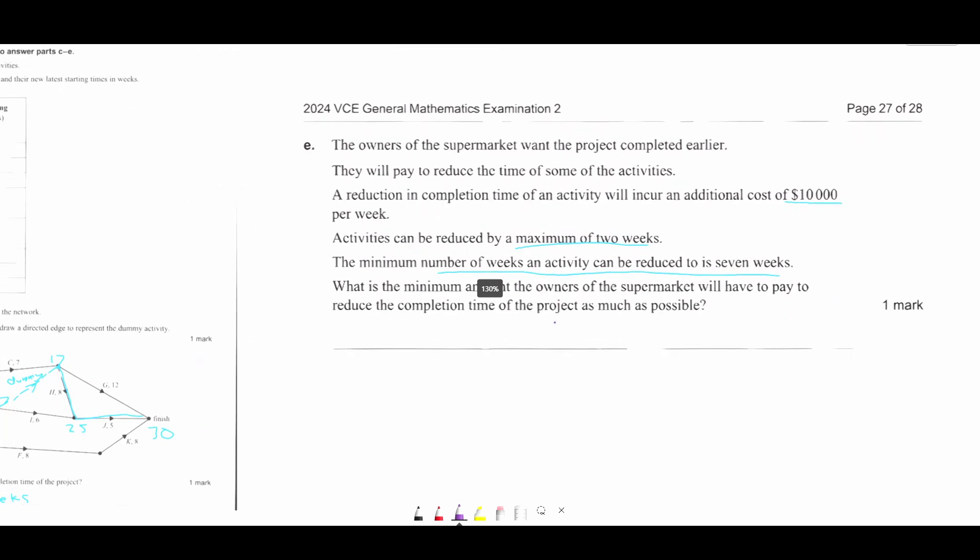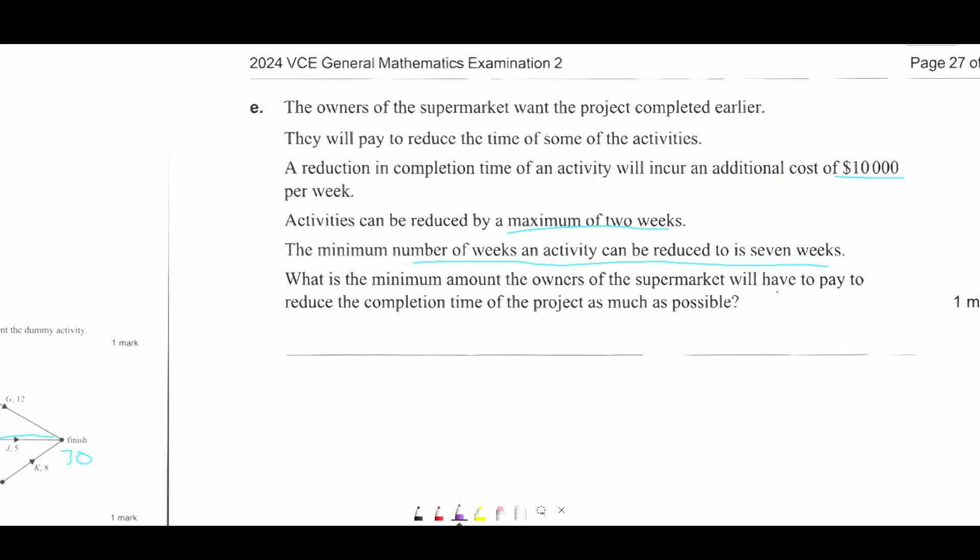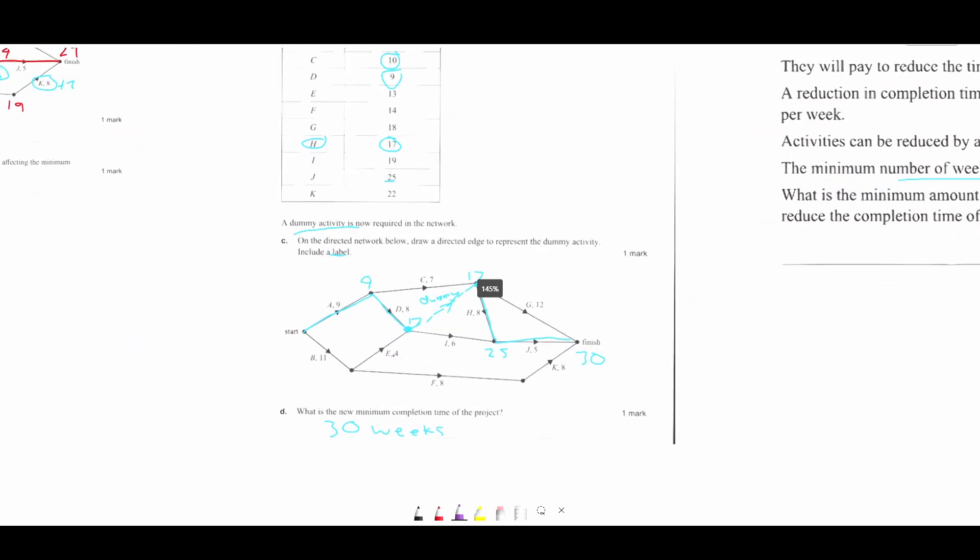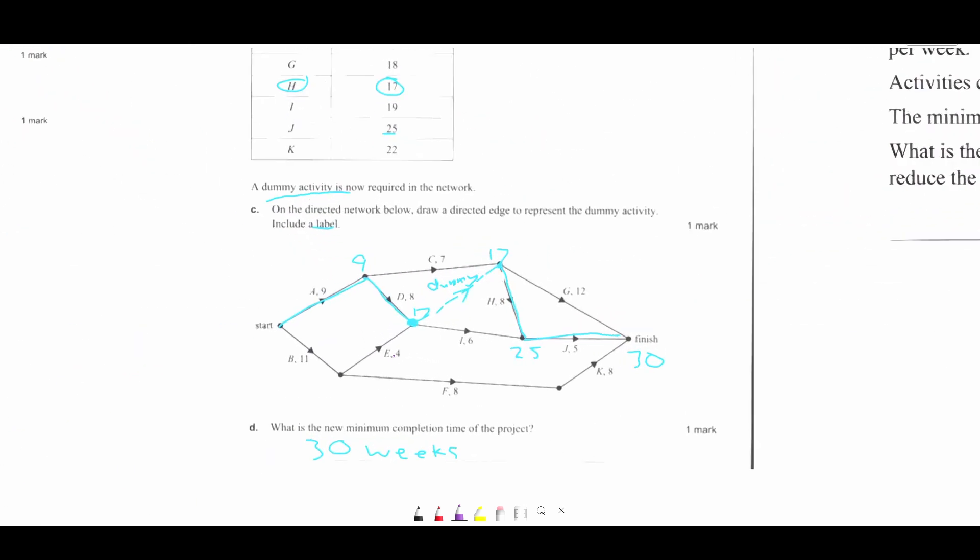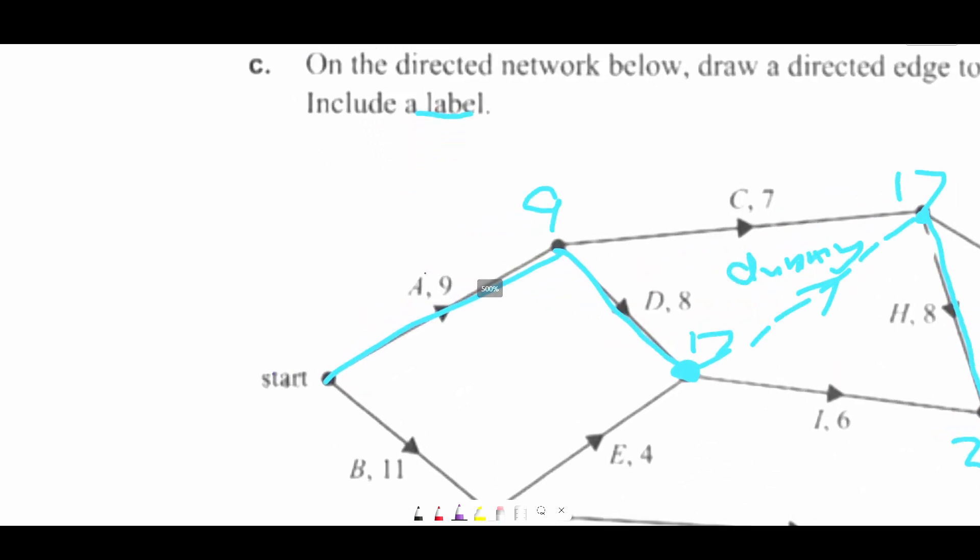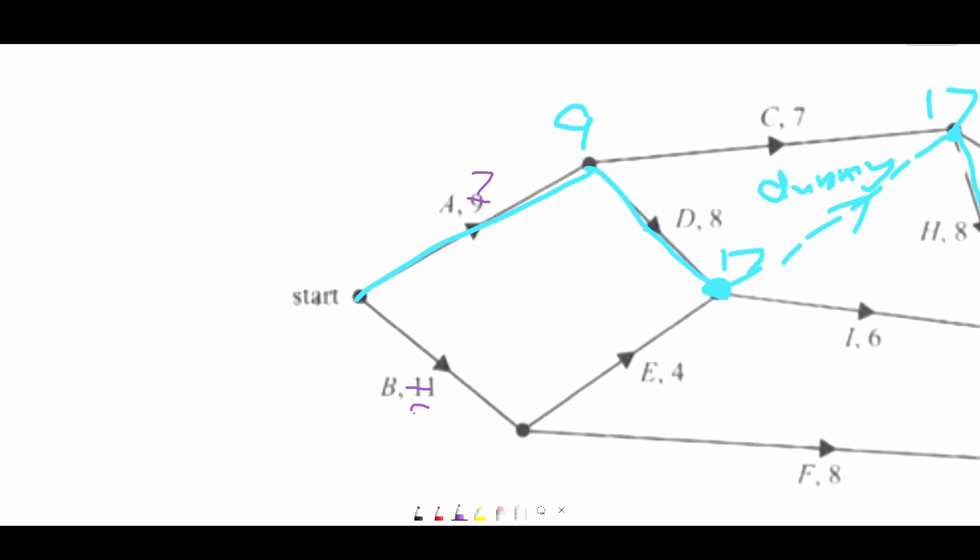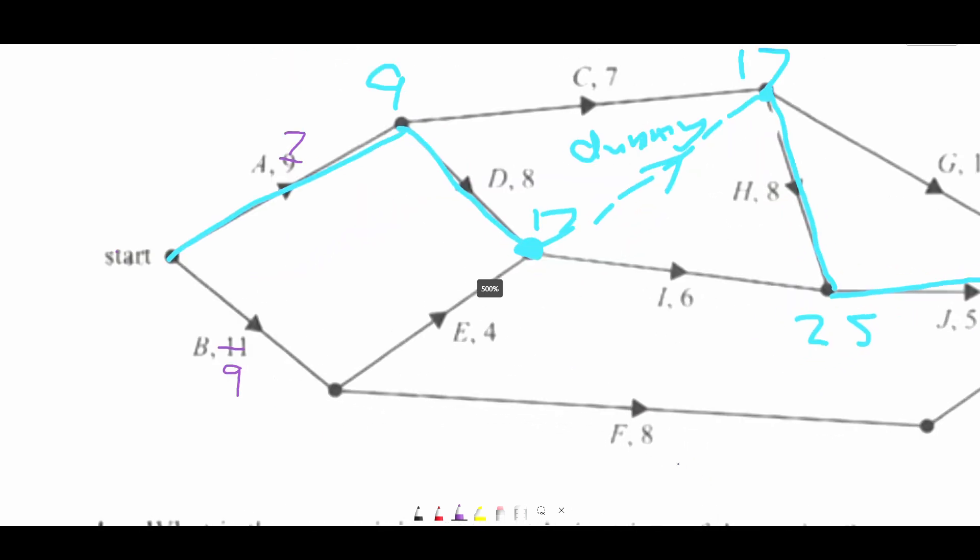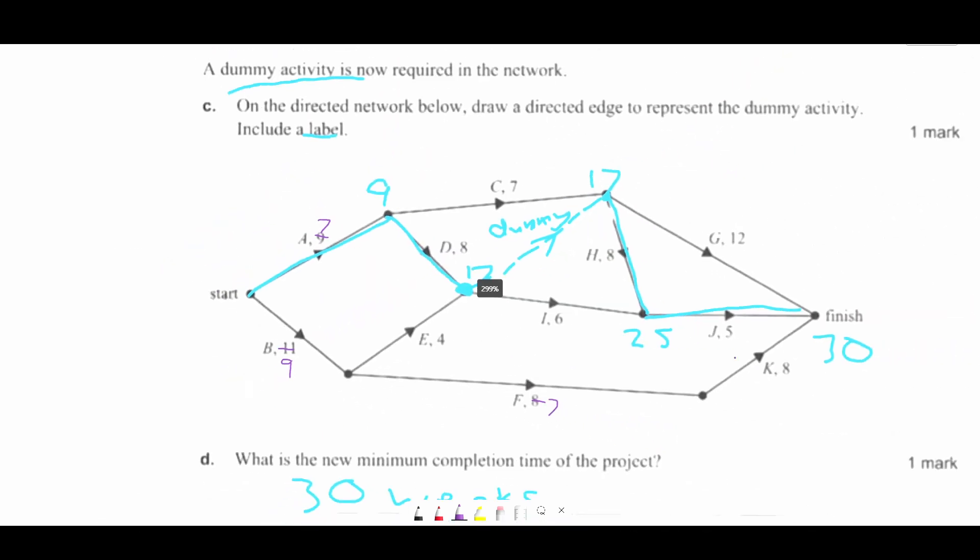So what is the minimum amount to reduce the completion time as much as possible? So what I would do here is just reduce everything to the maximum capacity and just see what the new completion time is. So everything that's above seven, we have to reduce it, reduce it twice. So this is now seven. And this one, we can only reduce it twice to nine. This one has to stay the same. This one becomes seven now. Seven.